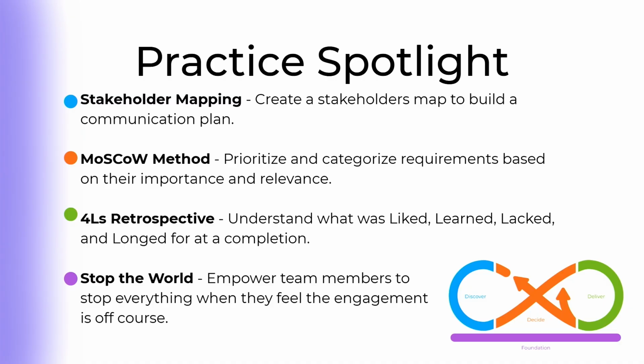And again, that's something you can do next time. Something you could long for might be an extra week, because who wouldn't want an extra week on a project, let's be honest. And then having these 4 L's, and having your categories for what happened in each L segment, that means you have a really actionable set of things to do for next time or to not do next time. And that gives a really strong structure to your retro.